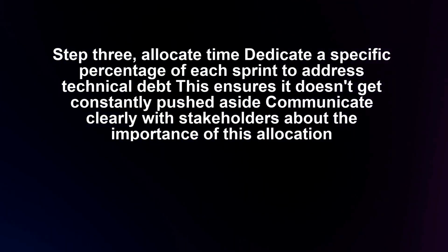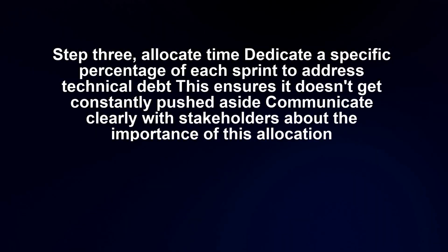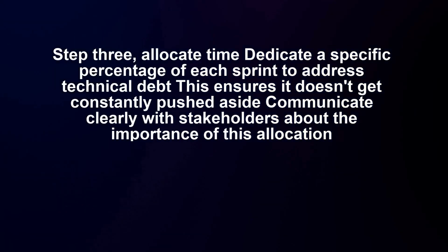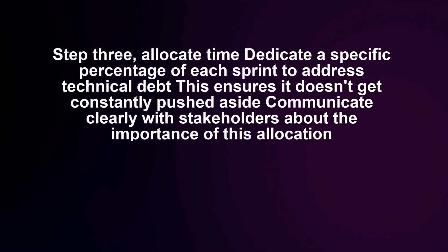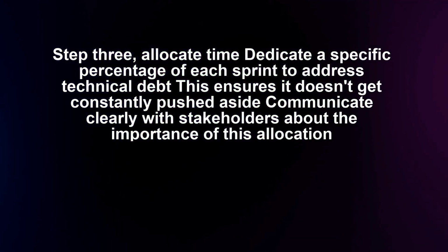Step 3. Allocate time. Dedicate a specific percentage of each sprint to address technical debt. This ensures it doesn't get constantly pushed aside. Communicate clearly with stakeholders about the importance of this allocation.